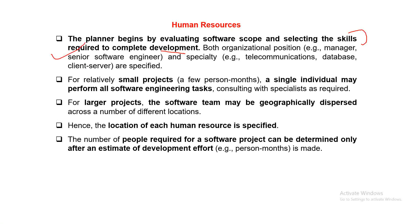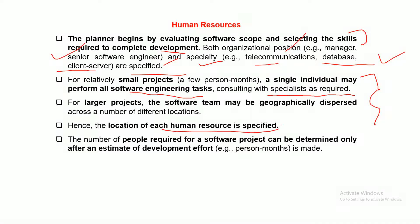You need to identify the skills required for this development — both organizational position such as manager, senior software engineer, and specialties like telecommunication, database, and client-server. You might need a variety of people with various skill sets. For relatively small projects, a single individual may perform all software engineering tasks, consulting with specialists as required. The number of people required for the software project can be determined only after an estimate of development effort.